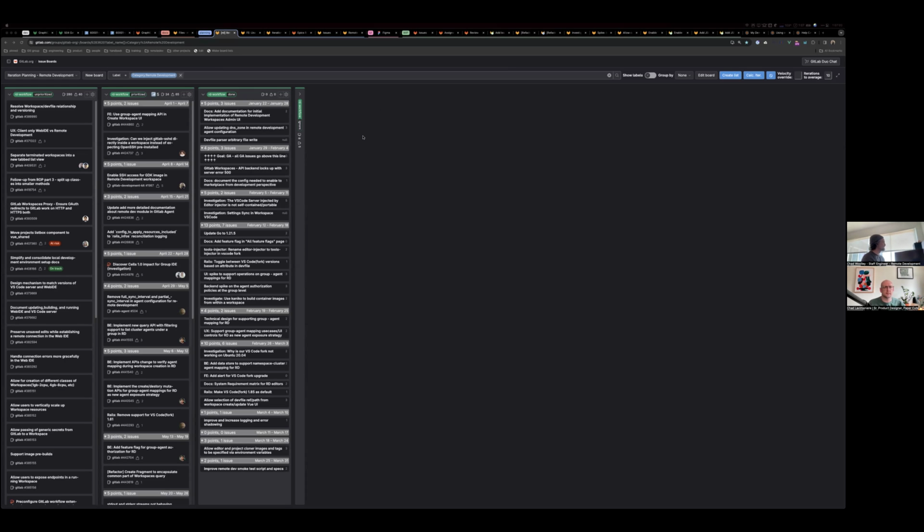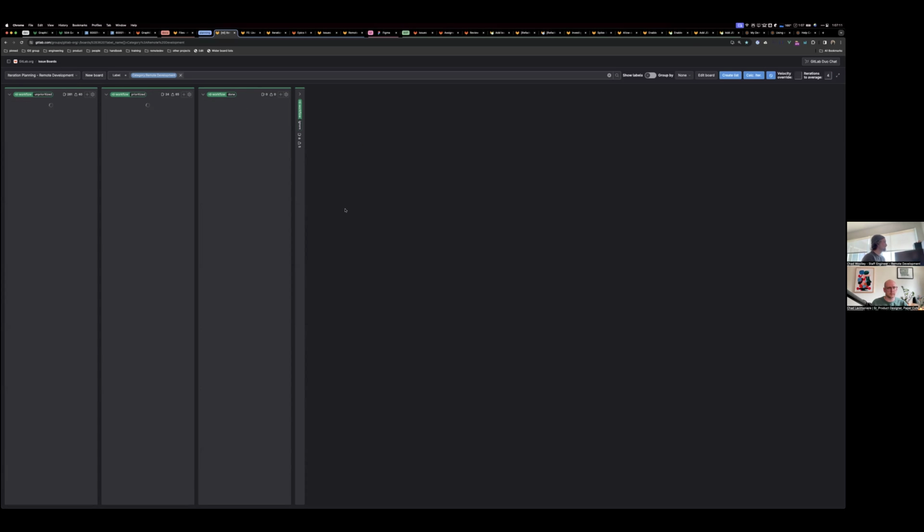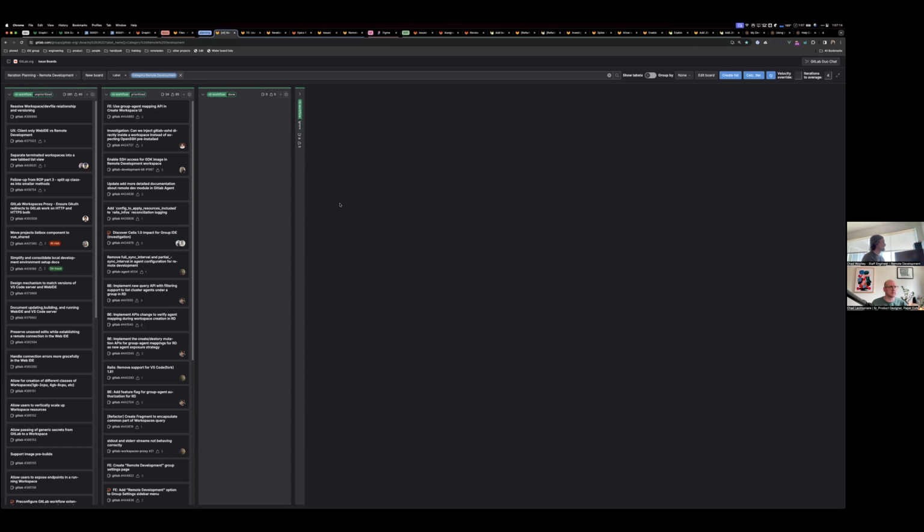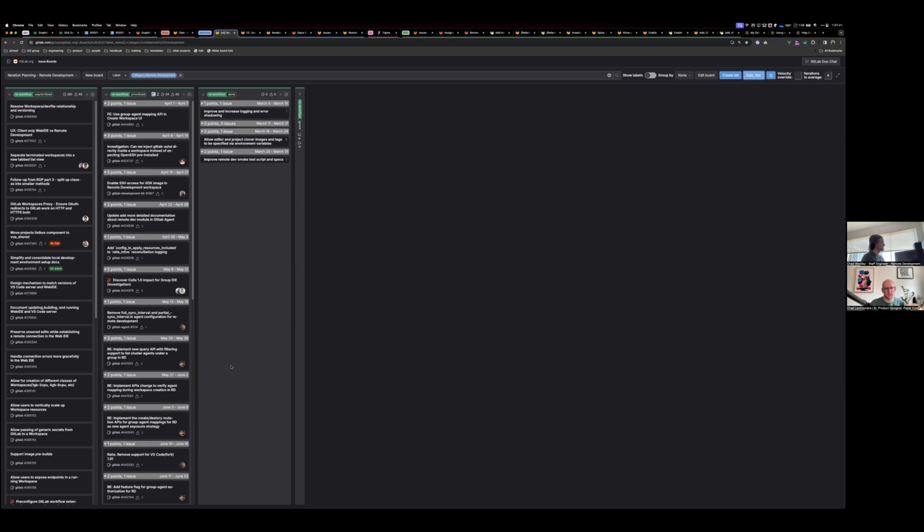So as you can see, our board does not look like a normal board. We do a sort of extreme programming inspired style of workflow that is emergent velocity. So we calculate our iterations based on the velocity. That's currently not possible in GitLab, but Dave's working on that. But we have this Chrome extension that I've hacked up that sort of matches up the API and hacks the CSS here and lets you do things, have this calculated iterations button here that will automatically inject the iterations.